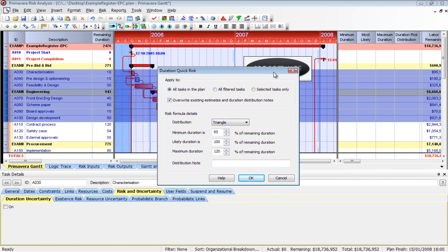When we're doing this, generally what we're trying to do is test the network up front. If you get data in internally or from a contractor that said, well, we ran through a risk analysis and we said every activity on the schedule has the exact same level of risk, it's pretty obvious that they were only trying to get a chart out to you. It's impossible to justify over a large amount of activities that every single activity has the exact same level of uncertainty. It's normally done just to generate an answer. From an owner's point of view or internally, it's important to ask for the inputs. It's great that you tell me the answer, but how did you generate it? So we're going to go ahead and just click OK here.